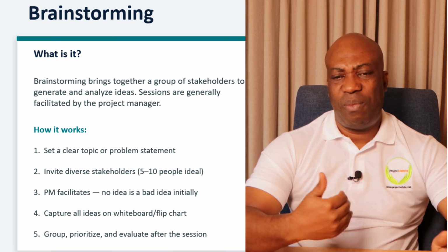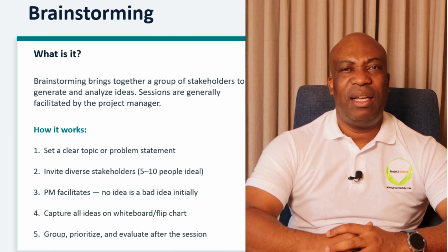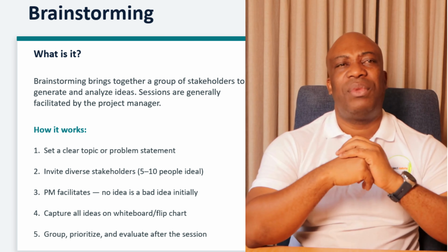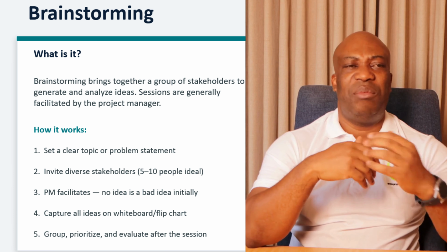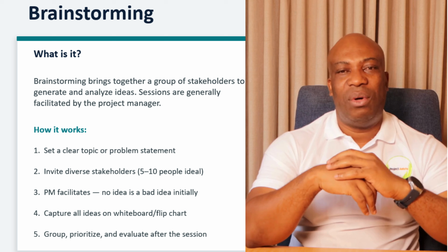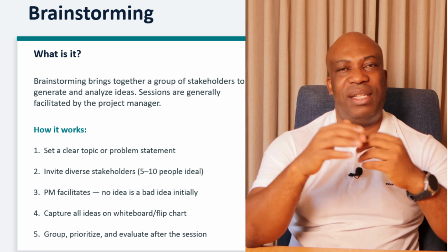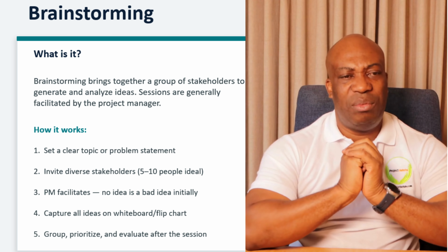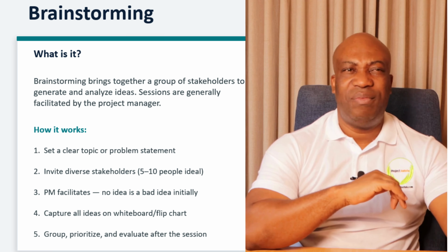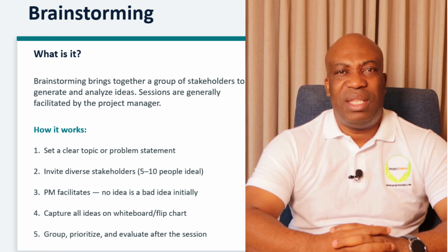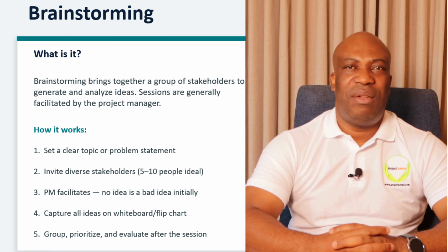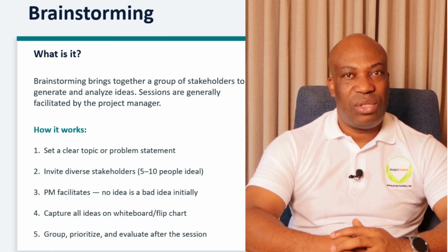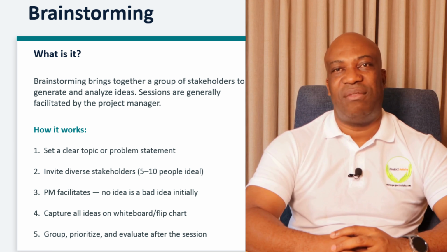This also helps you to gather a lot of information, especially, I normally use it during the planning stage. You want to get as much information as possible. I also use it in initiating a project, especially when I want to create or update the stakeholder register, or when I'm going through the stakeholder identification process. You bring a lot of people into one room. They can also help you to say, this particular item, yes, it's actually a stakeholder, this one is not. Someone will say it is because of 1, 2, 3, 4, 5, 6. So you gather a lot of information on that. So it's quite important that you also use brainstorming as a technique in gathering information in a project environment.